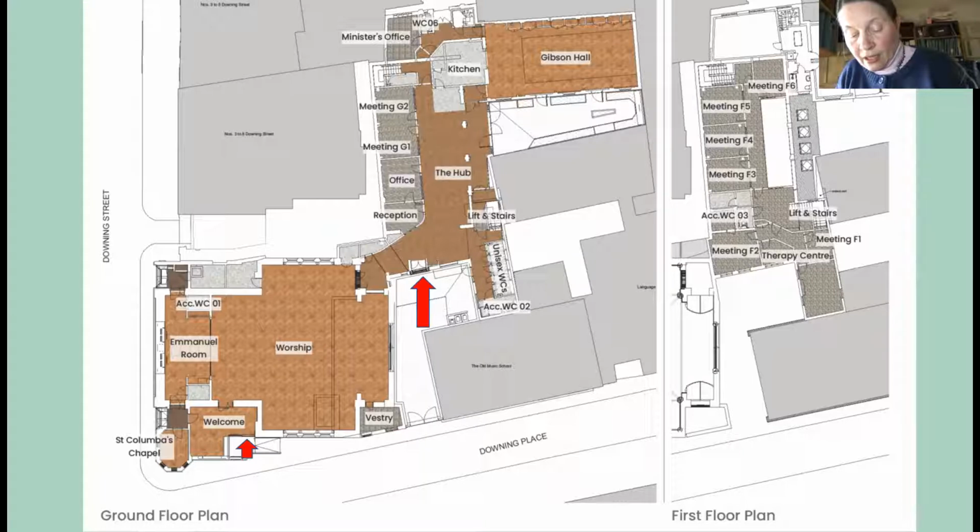So before we go on to the next slide, let's talk a little bit about our development strategy. A low carbon development strategy is a very sophisticated piece of work. It has to take into account the historic and aesthetic aspects of the building, energy baselines, benchmarks, targets, the U values of the construction, heating, cooling, airtightness calculations. You've got to have team competences. The building group, which is what I was on, the central client committee, has to talk to the architects and say what we want. The architects have to talk to the consultants. The consultants have to know how to do it. And then the consultants have to get the contractor to produce something that is of the right price and that satisfies the requirements.